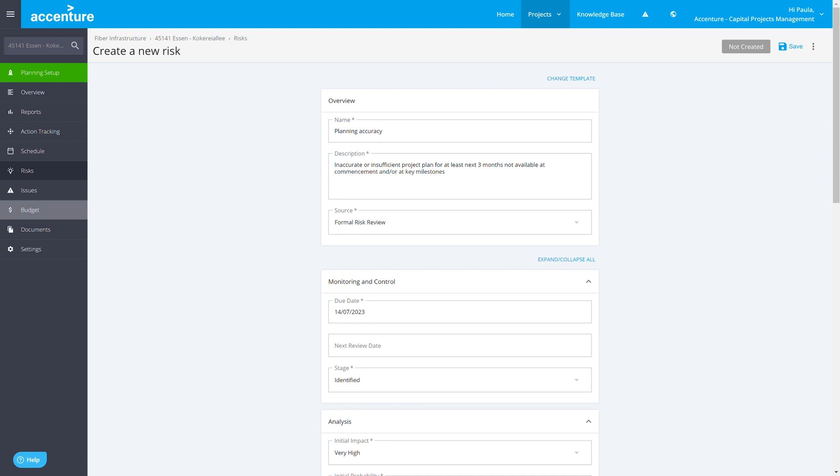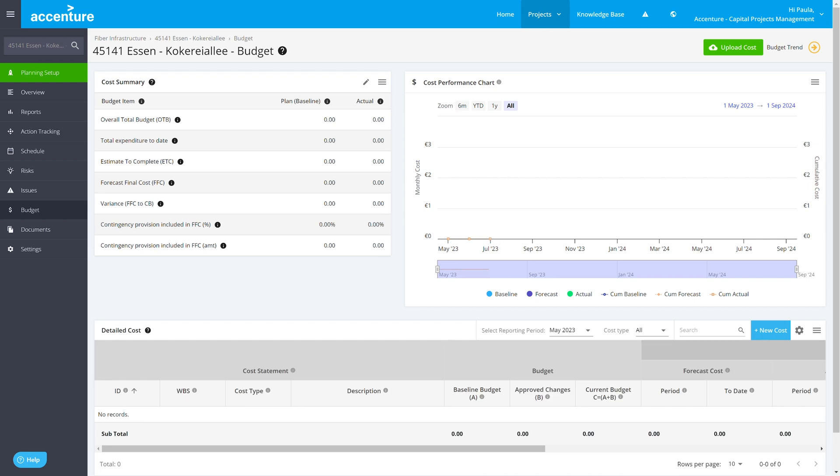You can also define a budget here. So, it's a very basic budget tracking, which you can also link theoretically with SAP. And you can see then the total expenditure to date compared to what you originally planned, and this can be updated either by taking the data from an ERP system like SAP or by simply manually adding it.